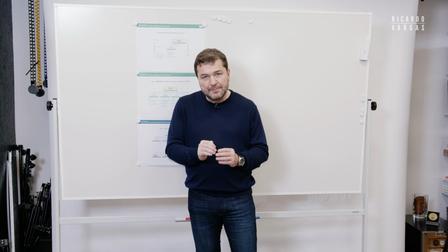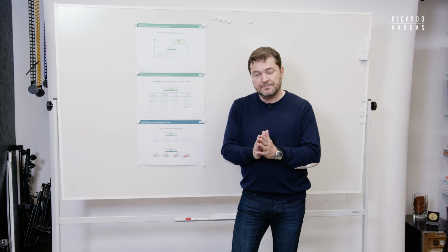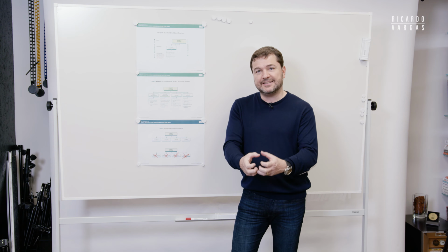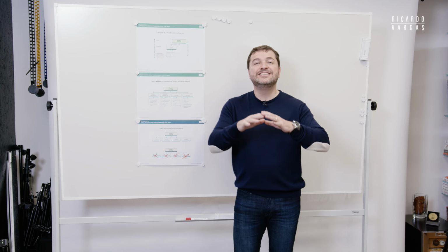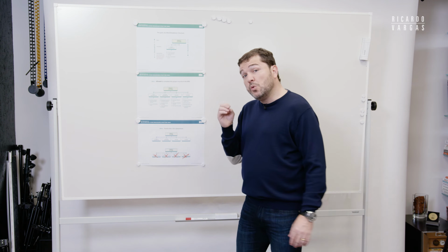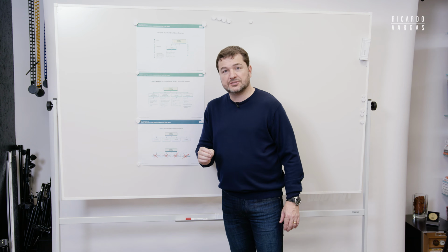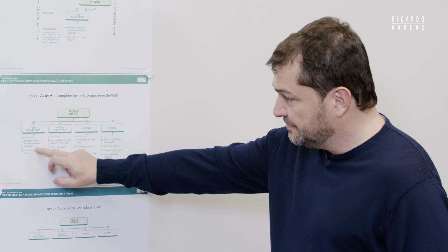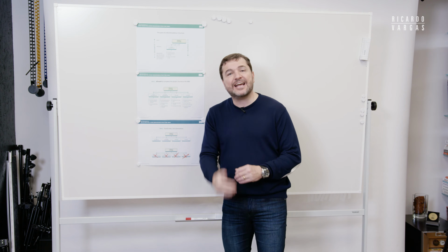And why this simple thing? Because every time you use a verb, you are talking about an execution item and not a division of work. You only use verbs on the actions. For example, every single work package is divided into a task list.